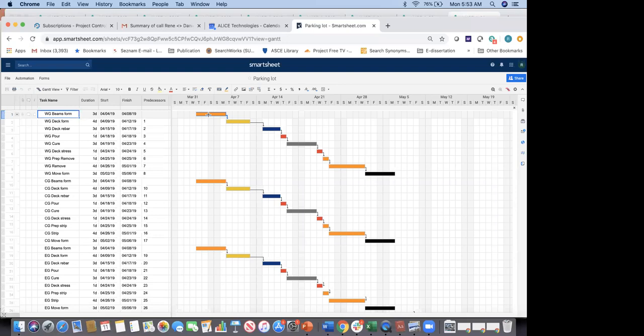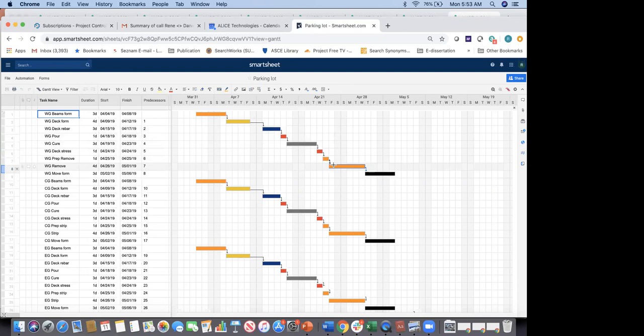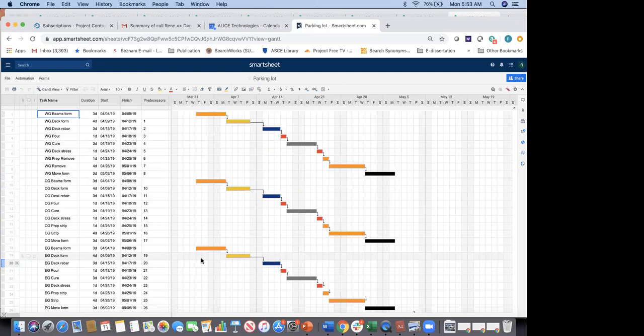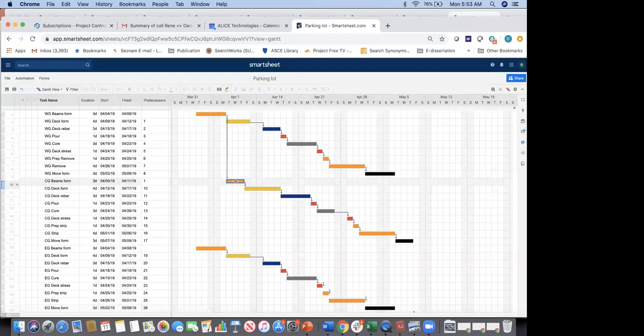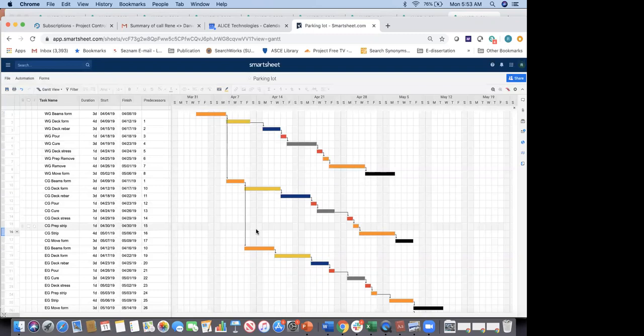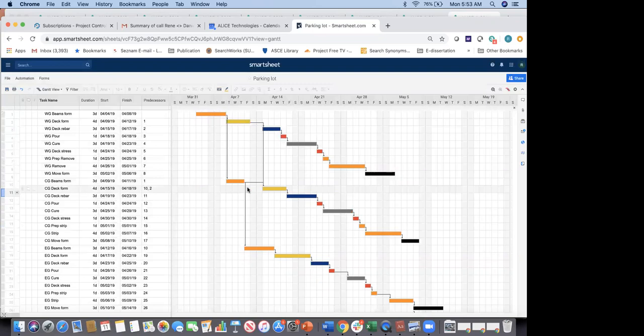Let's assume you have one crew of each type available. You cannot do these three things at the same time. In today's scheduling technology, somebody will say, 'I can't do these at the same time,' so they'll draw an arrow between them. Then there's a problem over here, so they'll draw another arrow. And that's basically how you schedule today.